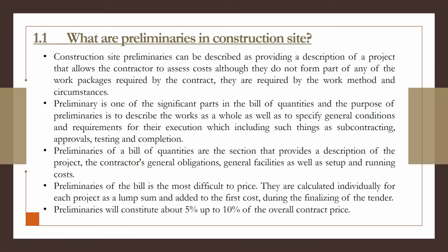What are preliminaries in construction site? Construction site preliminaries can be described as providing a description of a project that allows the contractor to assess costs, although they do not form part of any of the work packages required by the contract. They are required by the work method and circumstances. Other than that, it is a significant part of the bill of quantities, and the purpose of preliminaries is to describe the works as a whole, hence specify general conditions and requirements for the execution, which includes such things as subcontracting, approvals, testing, and completion.